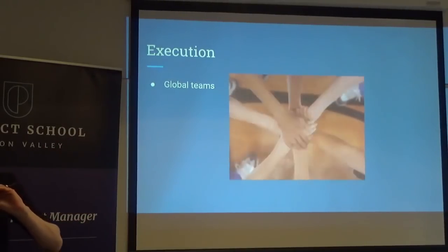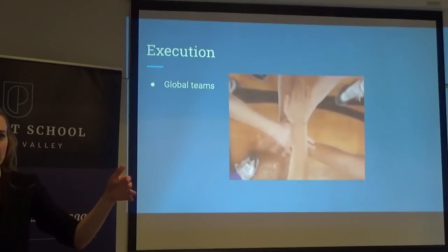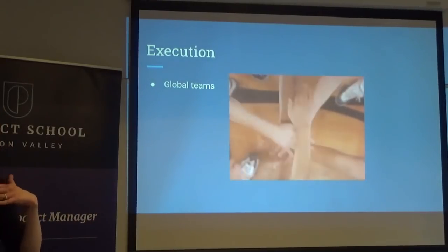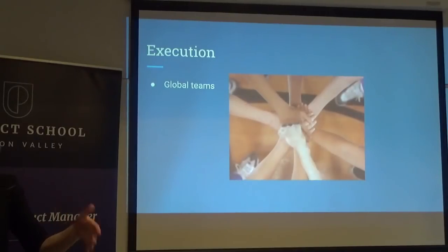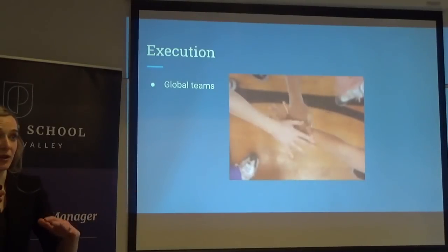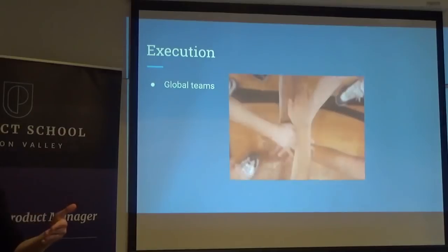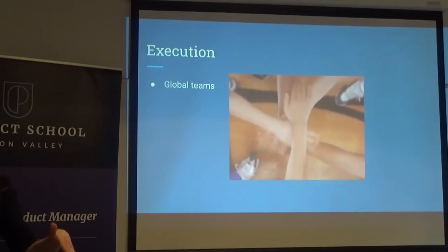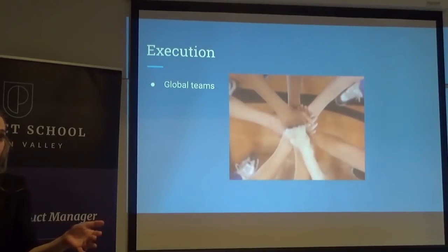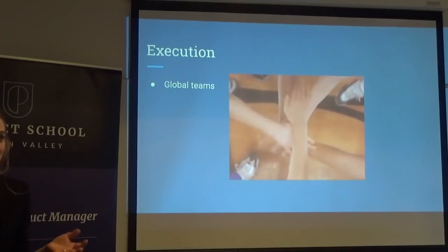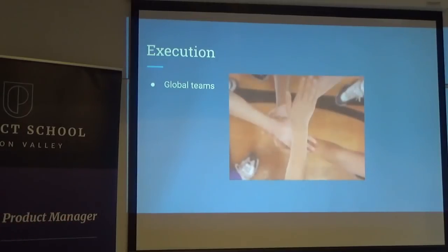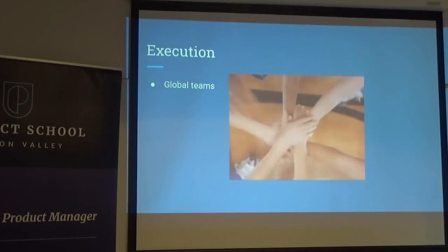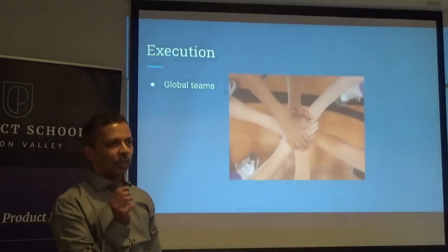It's basically looking at how many customers you are reaching, what revenue you think you can drive, whether you are confident that you will be able to execute your solution, and then what effort is required, because it's a measure of how much revenue and how much effort.